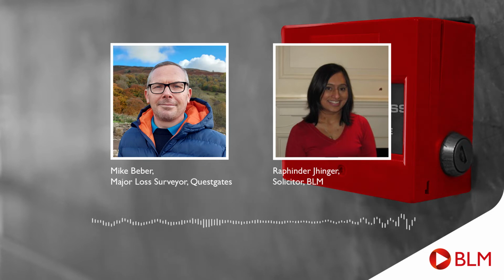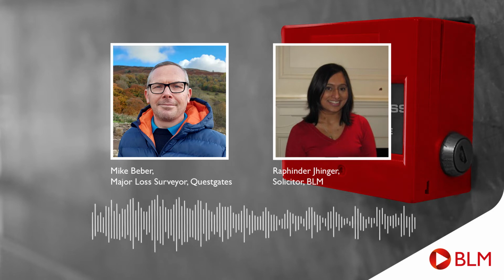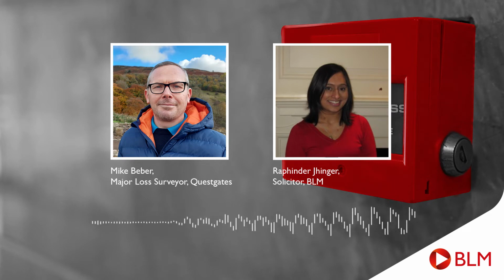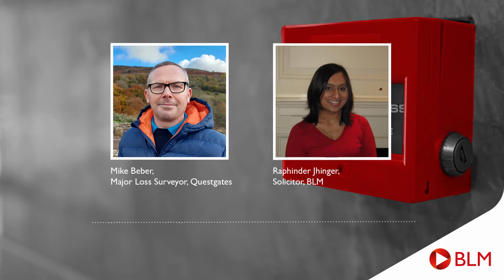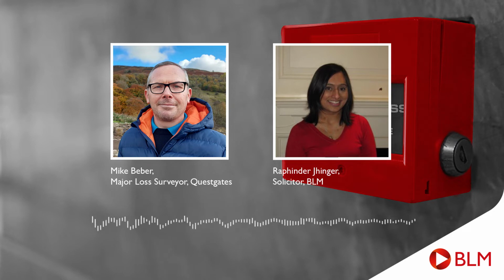Well, there are a number of issues which commonly present themselves when repairing modular type structures. The first being the trapping of water and fire debris between the modules, where fire extinguishment water has tracked through the structures, sometimes horizontally, and is causing damage in completely separate areas of the building to the fire, which is different to traditional. So it's difficult to fully identify where fire damage has spread, and a lot of the time investigations through opening up of ceilings and walls to check on damp levels or damage is the only way to fully identify where repairs are required.